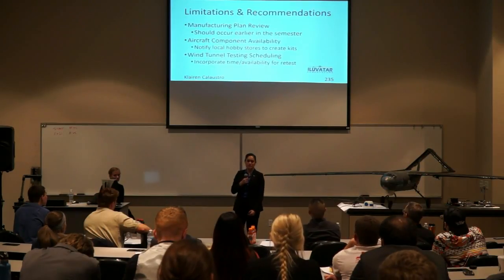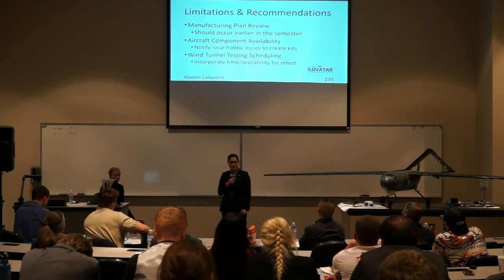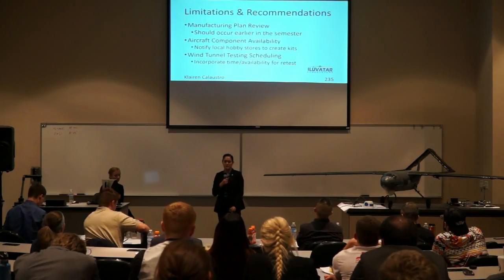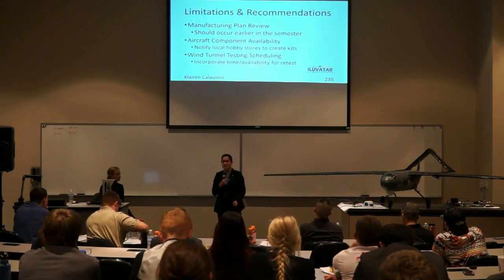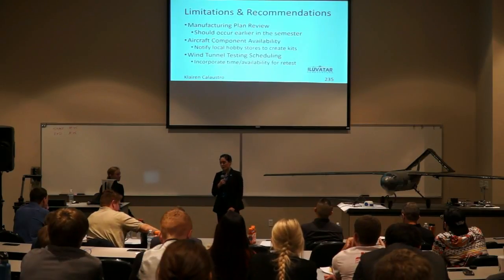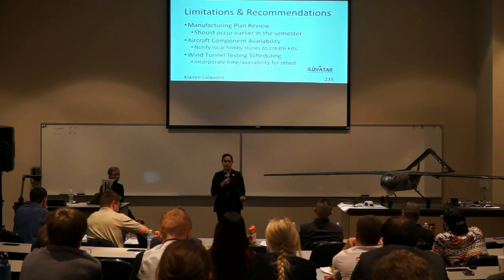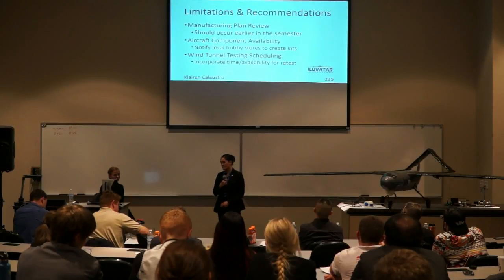And then wind tunnel testing. Mark Jaworska had mentioned our wind tunnel data was erratic, and that could have been resolved if we retested, but the wind tunnel was not available to us. So it would have been helpful if we were able to incorporate time or availability to retest.